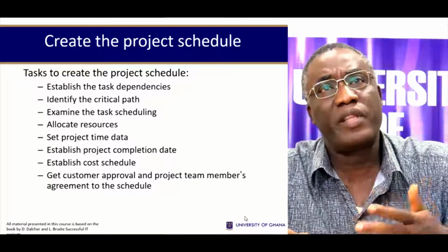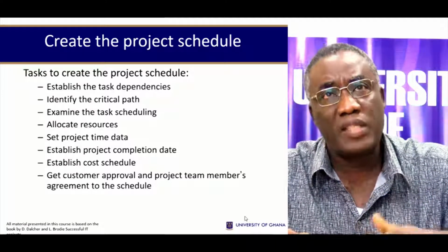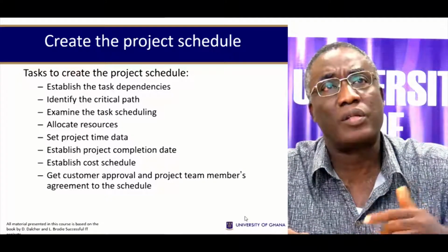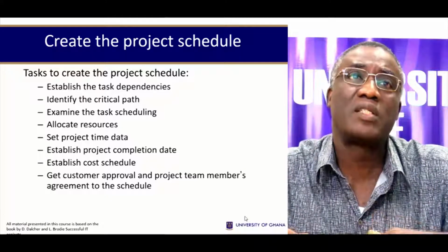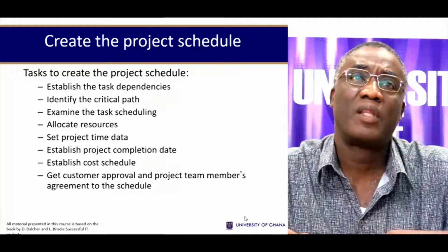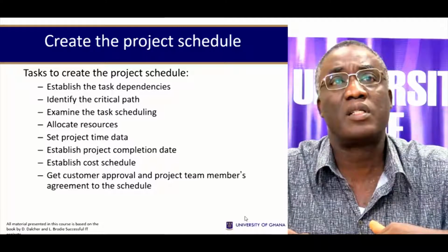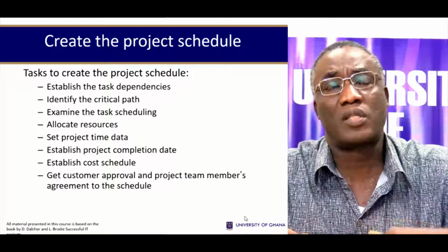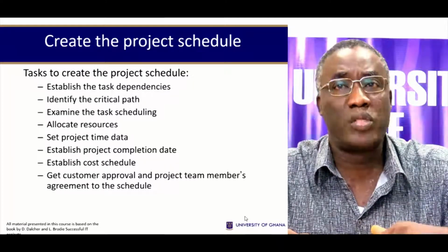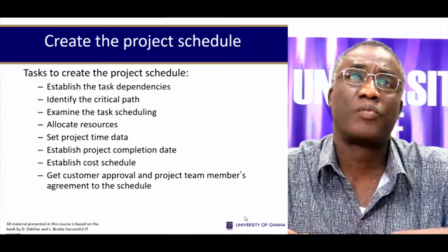And then you identify the critical path for this schedule. Examine the task scheduling, allocate the resources, set project time data, establish the project completion date, establish the cost schedule, get customer approval, and project team members' agreement to the schedule.